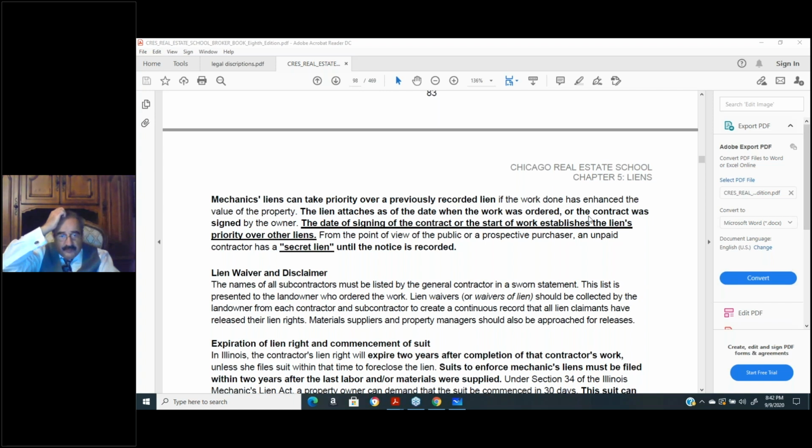How do you know what requires a permit? Well, a licensed contractor will know that anything structural requires a permit. Like I said, I did a lot of roofing jobs. To do a tear down on a roof and put up a new roof, I don't need a permit. But if they change the plywood sheathing underneath, yes, then I need a permit.